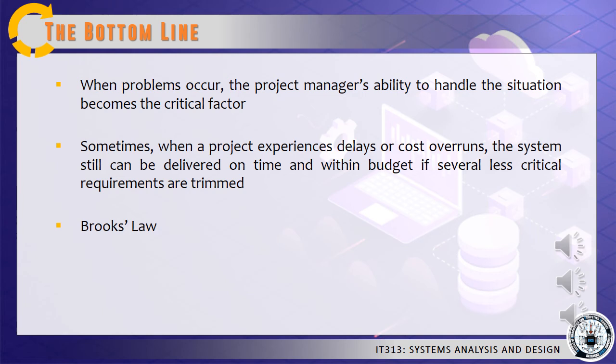When a project manager first recognizes that a project is in trouble, what options are available? Alternatives can include trimming the project requirements, adding to the project resources, delaying the project deadline, and improving management controls and procedures.